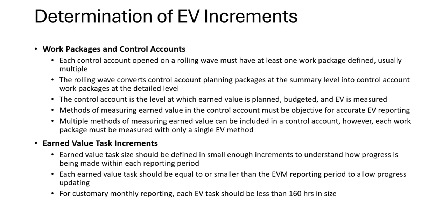So you would want milestones to complete within that month and not to drag out for multiple months, where suddenly you're spending multiple months' worth of funding and you realize you're nowhere near completing the milestone and it's gone too far for corrective action to be implemented. So you want small enough increments to measure within each reporting period. Therefore, each earned value task should be equal to or smaller than the reporting period.